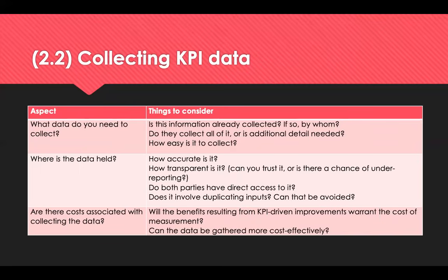Now, using that KPI data for performance management should highlight, encourage, and reward excellent performance as well as controlling poor performance. And then you may have contractual remedies for encouraging KPIs, but they can only work if performance levels can be determined with a reasonable degree of certainty. Each party should have the right to audit the information used by the other party to determine the KPI outputs.